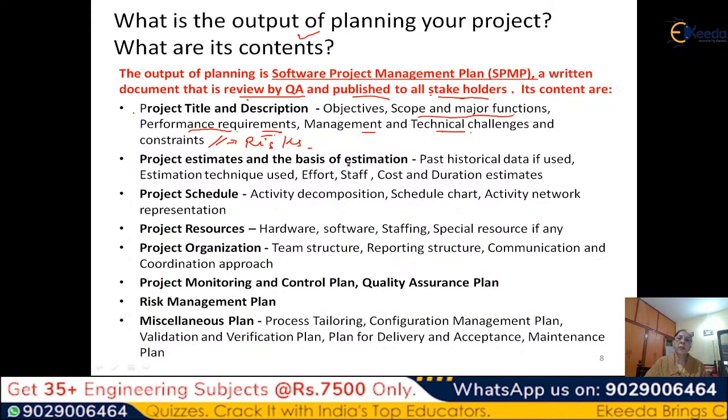Similarly, project estimates, the basis of estimation: how you have estimated, whatever you have estimated, what is the basis, and any past historical data that you have used. You will estimate the effort, the staff, that is the resource requirement, and also the cost and the duration. After doing the duration, you will make the schedule. Normally, many people think that the project schedule is the major plan. It's not really that. You have so many things.